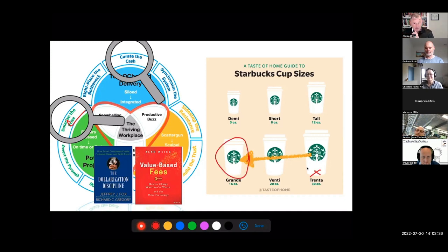Now, if you want to make money, you apply the espresso principle, which is the 80-20 principle, and you look at what you're building and you go, what is the espresso? What's the bare bones of that? So here is a little espresso cup. I think it's even Starbucks. So you look at this and you go, I want one or two shots of espresso. And then you sit down and you do the most painful thing ever. And you ruthlessly start with that. You figure out what the espresso is in your product.